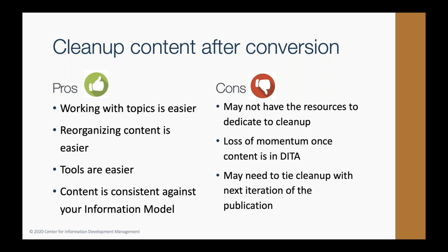Right. So sometimes once the content is converted, management is reluctant to go back and do the cleanup, saying, yes, that's behind us, we're converted, let's just move forward. But you can also tie the cleaning up of the content to the release process, so that if a writer is working on content for a new release, then you say, oh, by the way, in addition to documenting these new features and functions, we also want you to do the following cleanup things. But waiting to clean up that content for the next release means you won't be able to replace the old version with the new version.